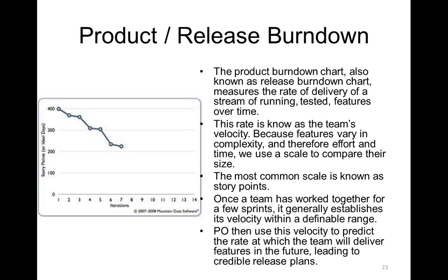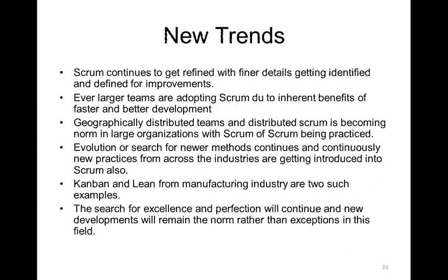In that situation, what we call the Scrum of Scrums is done. As we said, in the case of a team there's a daily stand-up, but in the case of multiple teams, each team's representative comes together and does the Scrum of Scrums, because again, teams have to keep in sync with each other. So this is how Scrum has been defined. This is how the deliveries are done in Scrum, and it is still continuously being refined for improvements.